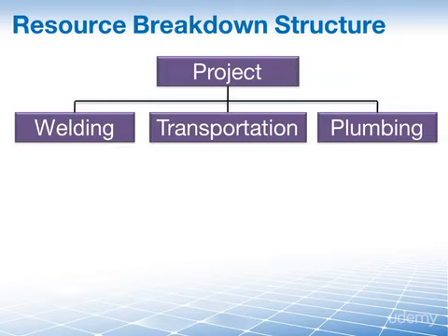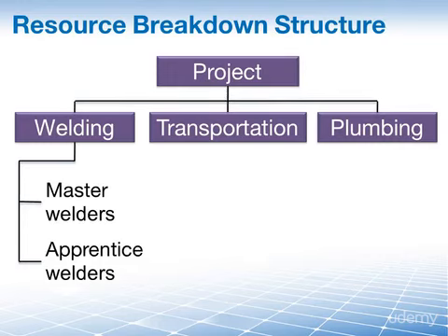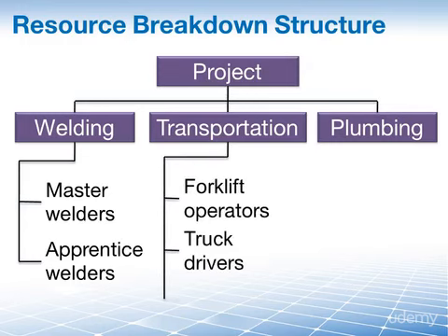Another thing we can do with our list of resources which we have identified is to present them in the form of a resource breakdown structure like you see here. This resource breakdown structure is our second output, and it is a great way of presenting the list of our required resources in a graphical format. In this example, we have chosen to show only the human resources that are needed by category. Of course, you could have other categories like labor, material, equipment, supplies, and so on.